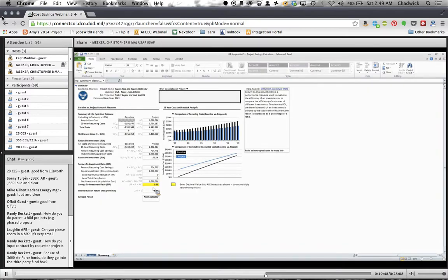If you haven't had an opportunity to look at the business rules, take a look at them at this piece specifically so you can see where to populate it. But in ACES, there's the other cost tab is where we're tracking this, and we want you to plug that decimal just as it's shown in there. You don't need to multiply it by any factors to calculate the points. We'll do that after the fact. And so that's it. That's how you use the tool.